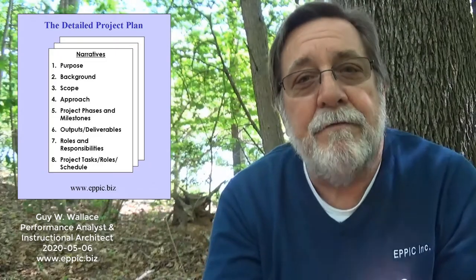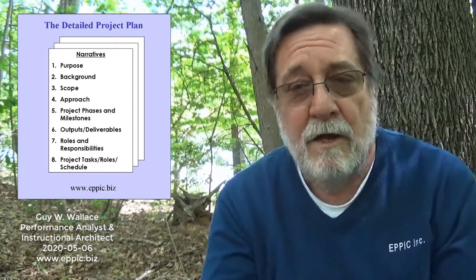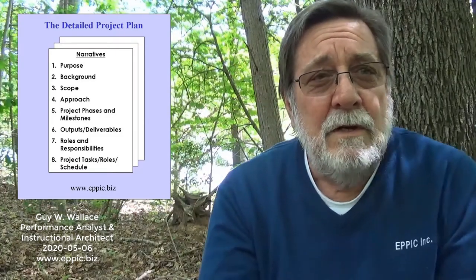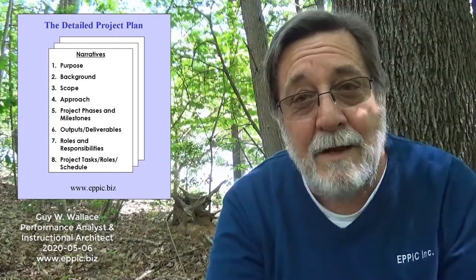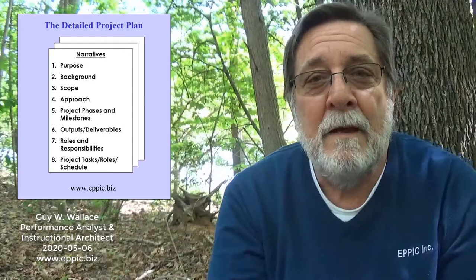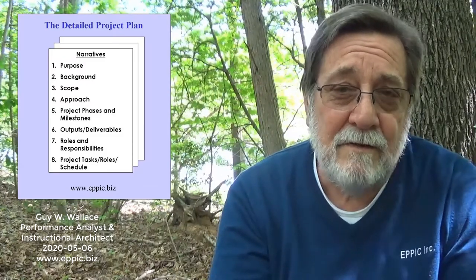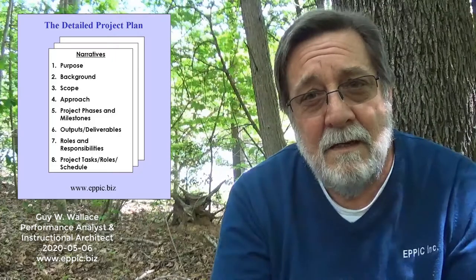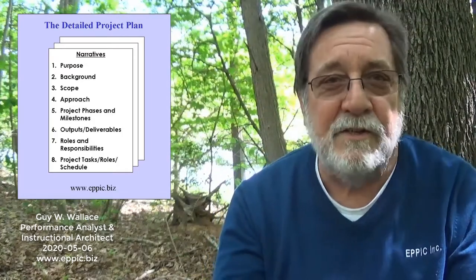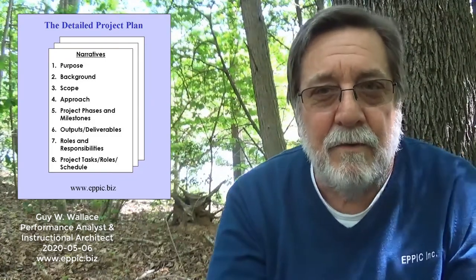break that down into the first half, fix fee that part, give them a reasonable guess, because oftentimes until we do the design, we don't know whether we're talking about a 2-day course, a 3-day course, a 4-day course, or a 2-day course with a bunch of job aids, performance support items. So I would then, after the design was done and we knew exactly what needed to be built, bought and modified perhaps, or built from scratch, I would fix fee price the last three phases of MCD, which were development, phase four, phase five is pilot test, and phase six is revision and release. And so making the updates post-pilot and then releasing that to whatever systems that they had for allowing people to access the content or to go into the delivery mechanisms, whatever they might be with my client.